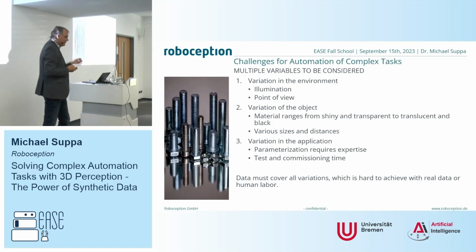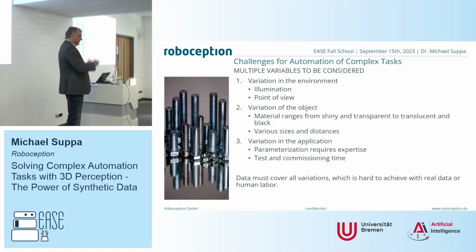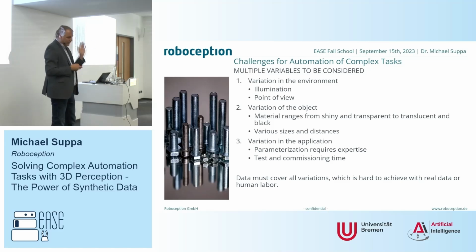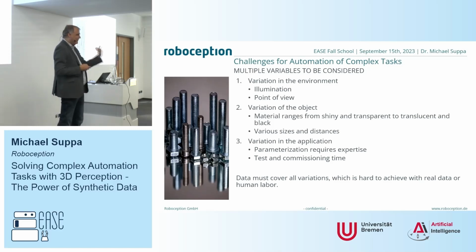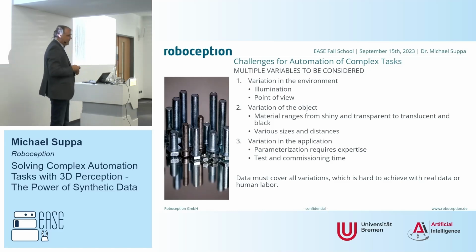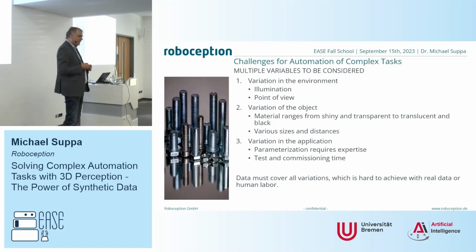When you have this installation, usually it takes a month. You go to the factory, you have to run through acceptance tests, so the machine is running, and the customer checks for every error that happens, and they are listed down. Next time you have a couple of weeks to improve that, and at some point it's running in production, because there are certain KPIs that you need to fulfill. This is also something you need to consider ahead of time.